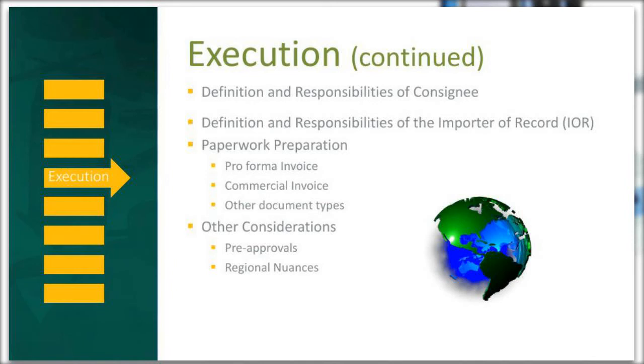So even though there's not a sales transaction taking place, your import shipments into countries will be assessed duties and VAT taxes. The list of detail that I just described that would be used to support your proforma commercial invoices, these are all standard requirements needed by each country's government during the importation process.